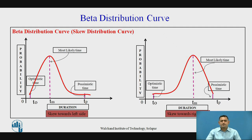The beta distribution curve is a skewed distribution curve. Unlike the normal distribution curve which is symmetric at its apex or center, in the beta distribution curve the curves are skewed to the left-hand side as well as the right-hand side.